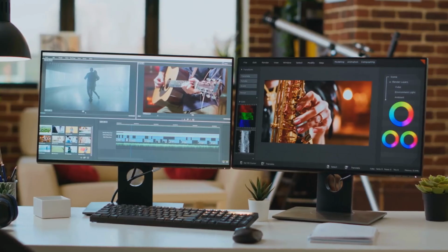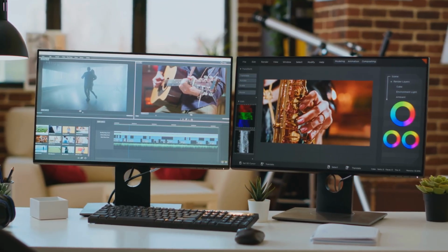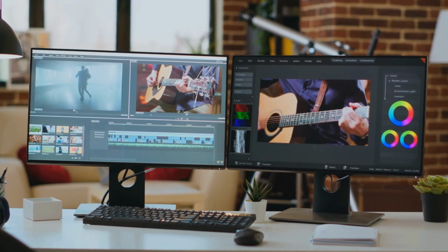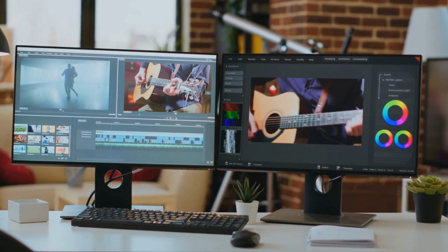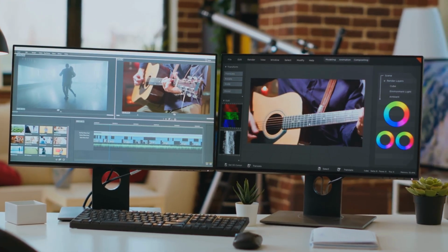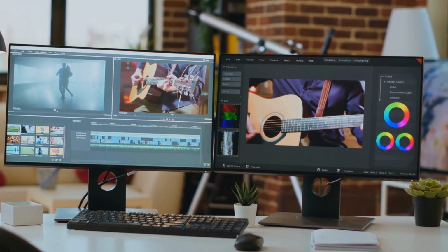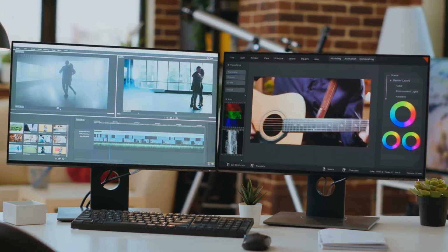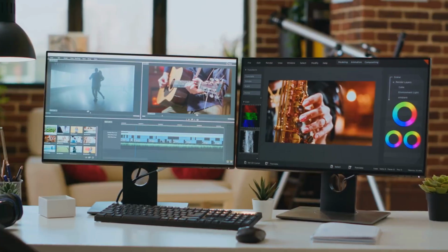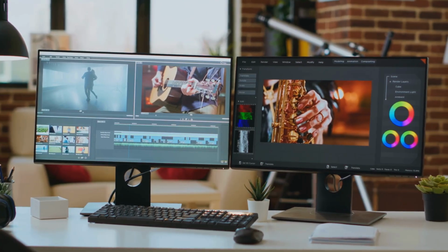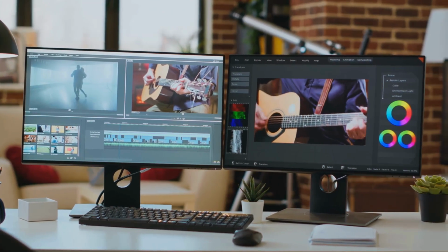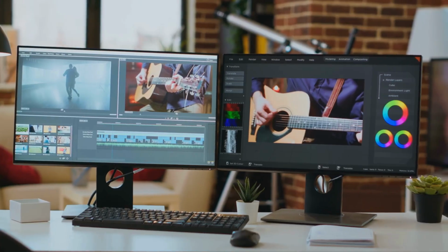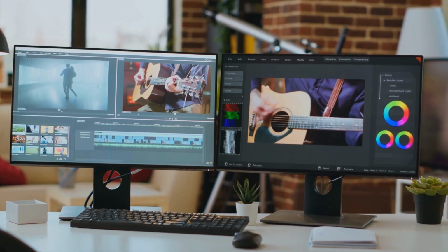The micro-budget strategy is simple. Maximize favors, minimize cash expenditures, and lean heavily on passion and relationships. You're looking at very limited shooting days, typically 3 to 7 days total. Small crew of 5 to 10 people. Heavy reliance on deferred payments, which means people get paid only if the film makes money. Use this approach if you're making your first indie film, a proof of concept, or a festival short.